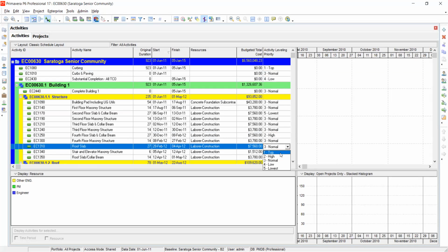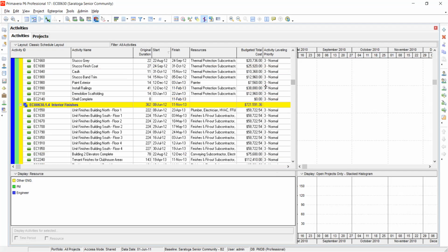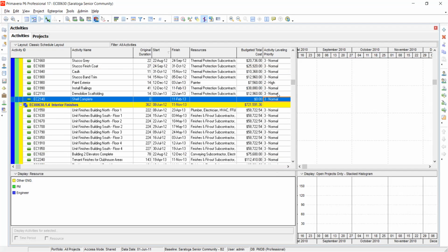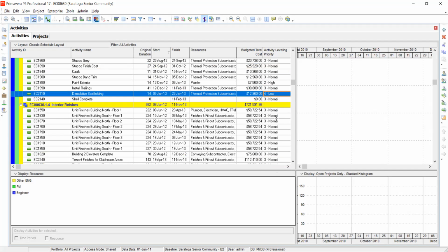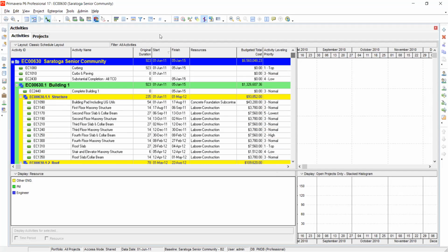Here I'm just doing it for demonstration. But critical activities should have top priority because a lot of activities depend on those ones. Okay, let's work with this and see whether it will change or give us some difference.